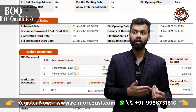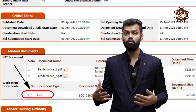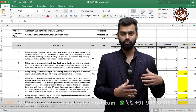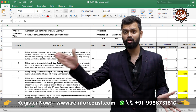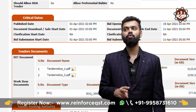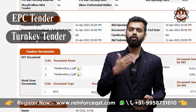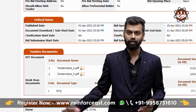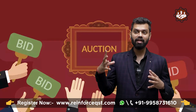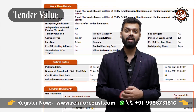Next is BOQ — Bill of Quantity. BOQ is the client's budget document with all specifications; rate quotations from the client side are given in the BOQ for contractors to participate in bidding. Without a BOQ, not a single tender can be released. The exception cases are EPC tenders and turnkey tenders, where the BOQ is not provided by the client — the contractor has to prepare it. The final rate quotation in bidding is made against the BOQ.